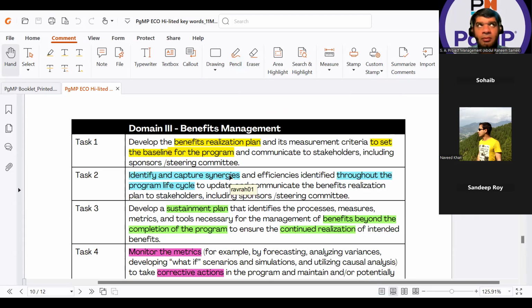But even in the benefits management plan, there is something called linking with components: link component outputs, outcomes. Those are separate. But when they talk about the mapping, and also show it as in your program management plan, then the benefit register is the answer. Otherwise, you will be better off analyzing the situation when the question comes, whether it's a plan or a register. But normally, it should be clear. Mapping of the benefits as reflected in the program management plan is your benefit register.